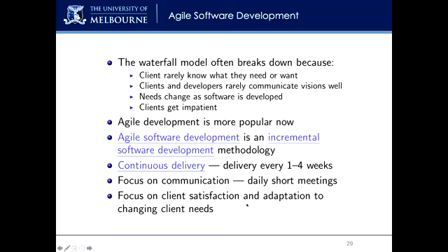So generally, you will want to consider the concept of agile working. Agile working is simply saying that we have a project that's this big, and we chop it into small sections, and each section we will call a sprint, and we will get that section completed within a sprint. But every single day we will have what's called a scrum.